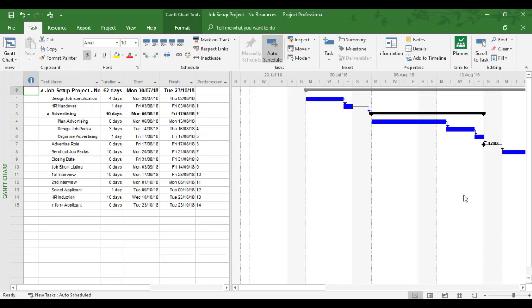So in this example, we've now got two tasks at the bottom. We've got HR induction and inform applicant, whereby it should be the other way around. It should be HR induction after you've informed the applicant. So we need to move these around, but there's different ways of modifying and changing orders of tasks.